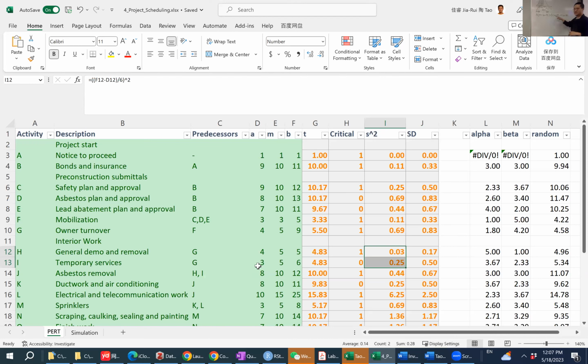So first we calculate the probability that the entire project is done within 95 days. Then we calculate another probability that it's done within 85 days. Then subtracting these two quantities, that's how we get the probability that a variable falls into this middle zone.